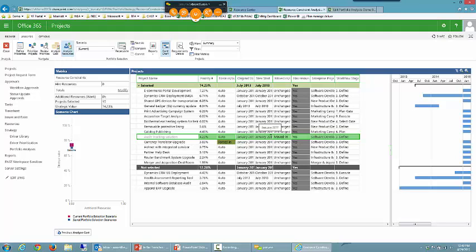but I only have 10 minutes left, and actually I don't have that much time left in the demo. I've got about 5 minutes left, so I got to make some things happen quickly here. In a real portfolio analysis, I would probably do this, maybe a couple months at a time. Move it out a little bit, see if it has an impact. Try a little further, see if it has an impact. Maybe move this one and another project out a little bit. So there's a lot of iterative steps that come into play here.